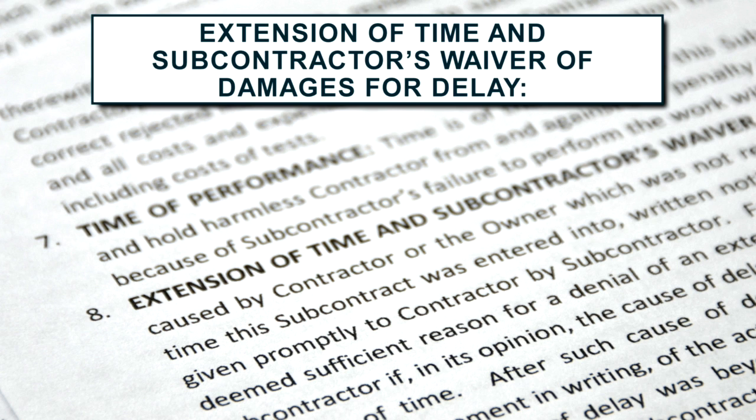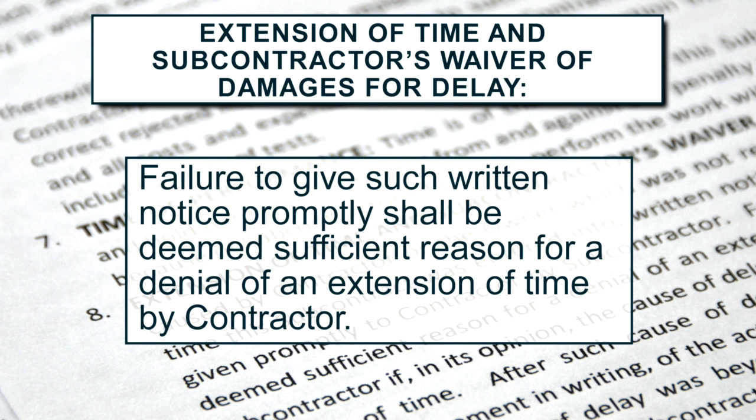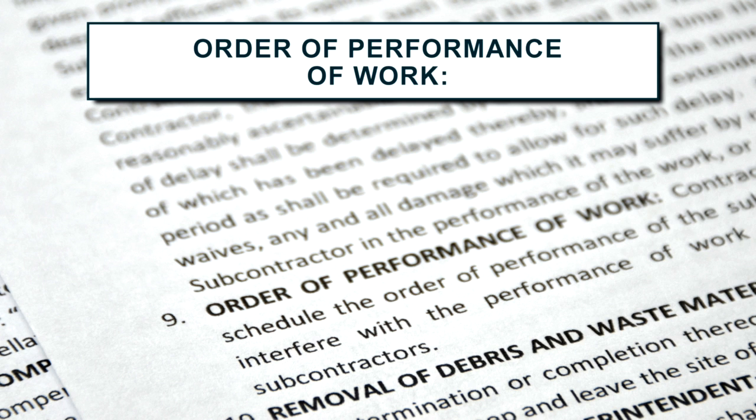Paragraph 8 deals with extensions of time. Now, if time is of the essence, there may be reasons that you deserve a time extension. But look at this. It says, failure to give such written notice promptly shall be deemed sufficient reason for a denial of an extension of time by the contractor. So again, if you don't give that written notice, you are going to be swallowing any costs related to the time extension.